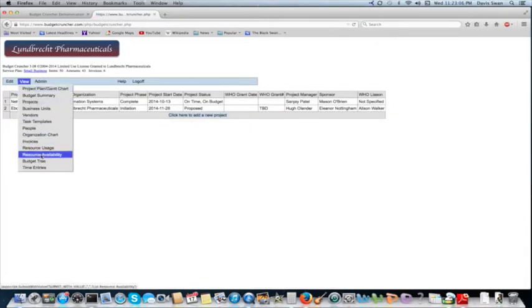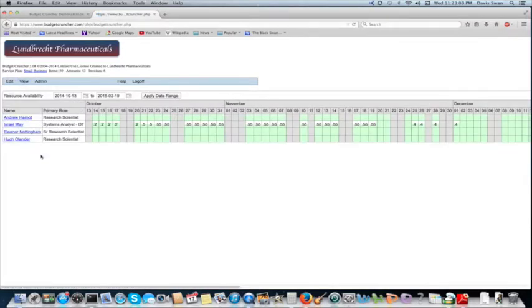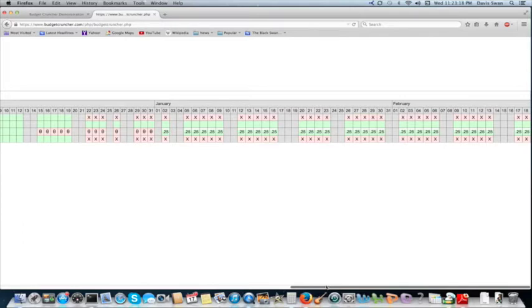This display has a few additional visual clues to help manage project resources. Just as in the previous resource displays the weekends, statutory holidays and vacation times are indicated as non-working time. For working days, the display now provides the fractional total allocation for each person from 0 to 1.0. The green background indicates how much of the person's time is still available. For example, if the allocation indicated is 0.25, then the green background will show the person as 75% available for other assignments. This combination of visual clues makes it very easy for the resource manager to plan assignments.